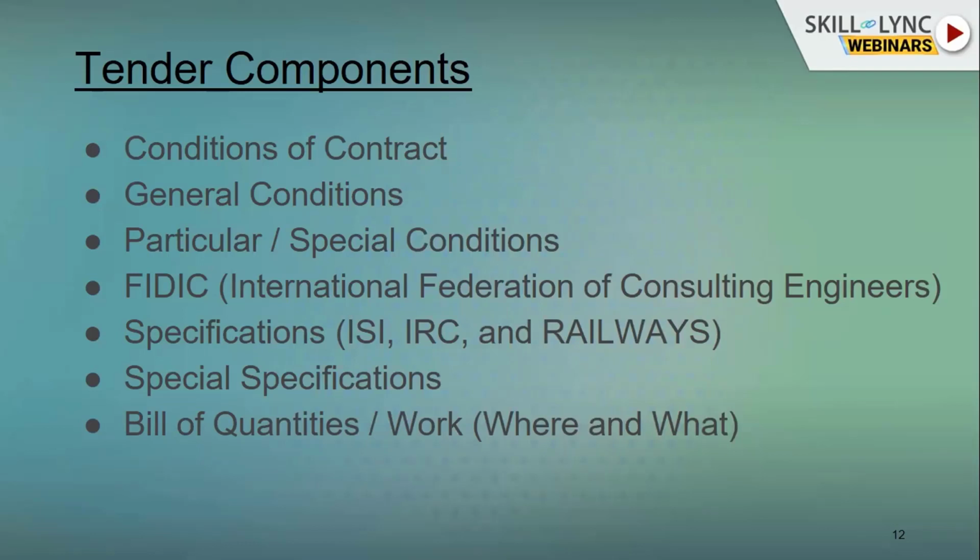Bill of quantities is a complete, detailed, item-wise specification along with the unit quantities, and those quantities have to be calculated with the help of AutoCAD or different software available in the market. The quantities have to be nearly 100% accurate to arrive at the best cost of the project.